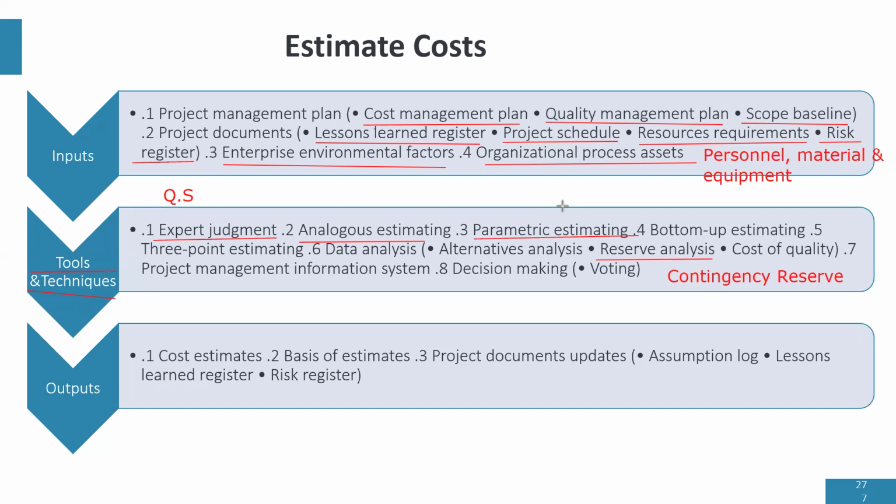And I have a house of 100 square meters, right? That means that the cost of tiling will be 2 million, right? At 20,000 naira per square meter, right? And what I've just done is I've used parametric estimates to determine the cost of tiling.